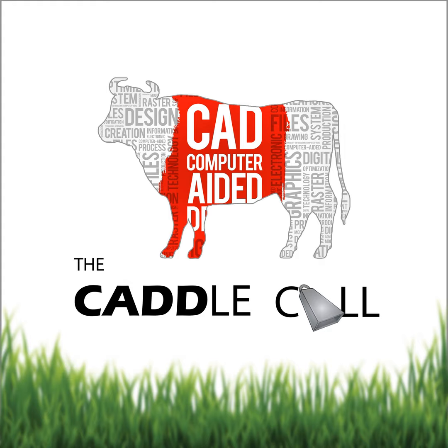The process of developing tool sets can be handled by anybody who is reasonably comfortable working in Bluebeam Revu. It's nothing more than building the symbols and the tools that you need, which can be done using basic markup tools like circles and squares and some basic text. You're just creating symbols. After you've created the symbol, you group it together as a single object, and then you build a tool set and add the tool to it.